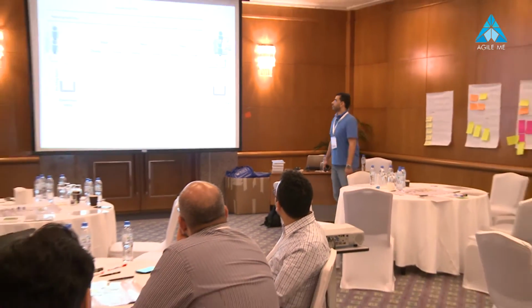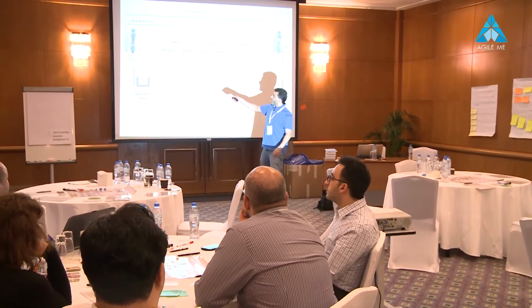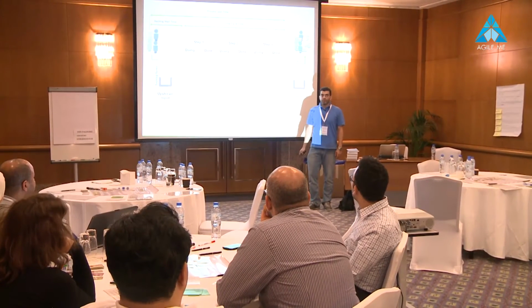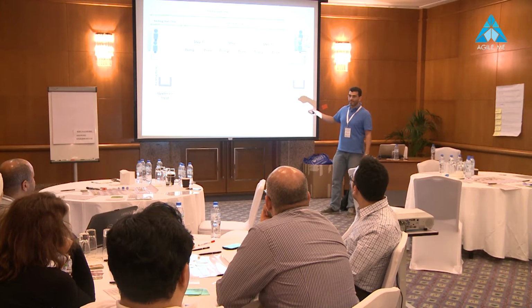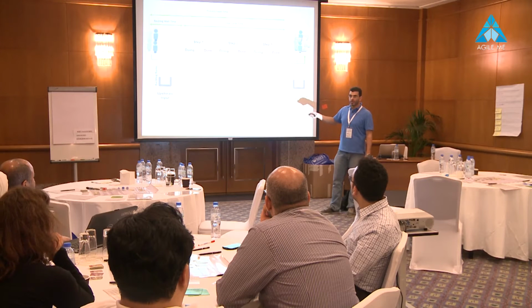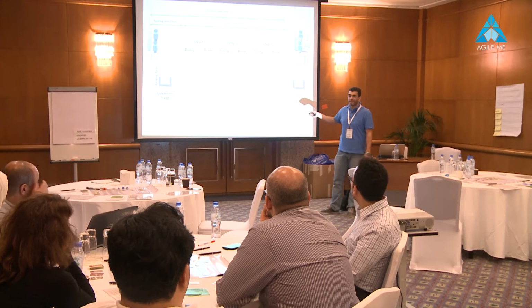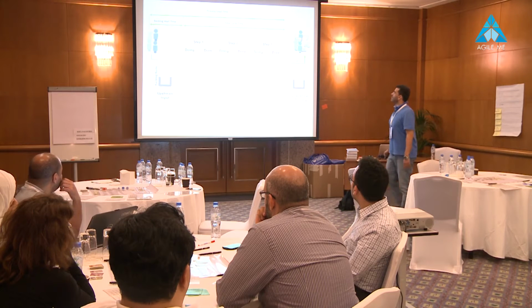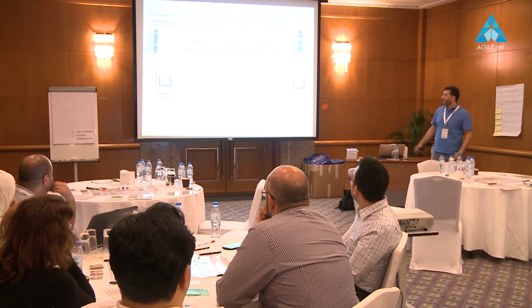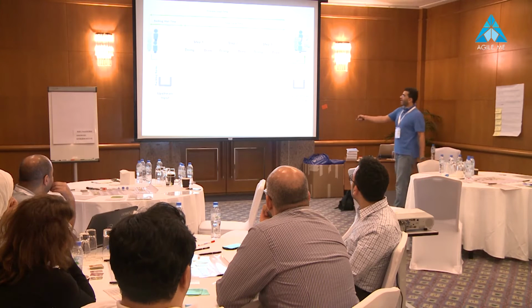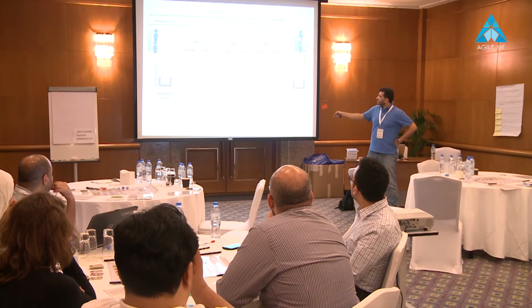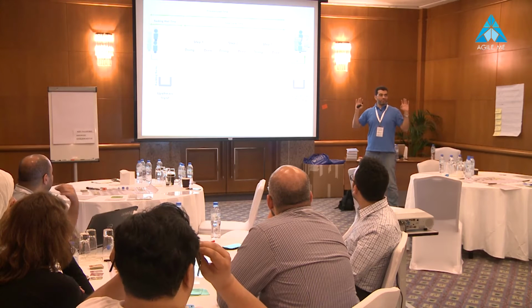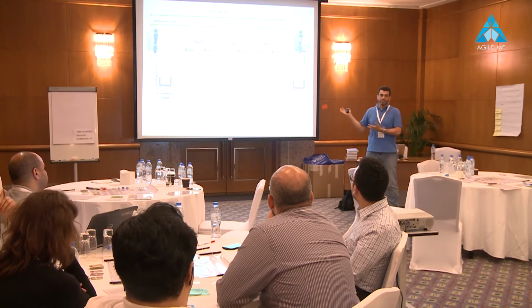Now, as you can see, every single step has a doing part and a done part. So if I'm doing something, I'm done with it, so it's waiting here to be consumed by the next step. If someone is designing a feature, he has finished designing, but the developers are busy taking any of these designs, it will be waiting here. So we can visualize these parts as wait time versus activity time. Features or backlog items waiting in the done areas are just waiting. No value-adding activity is taking place here.